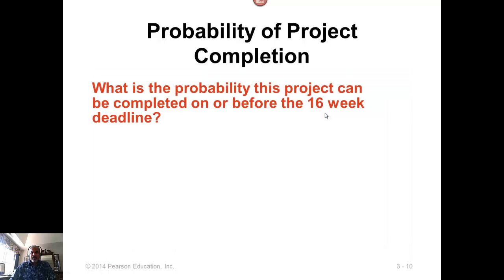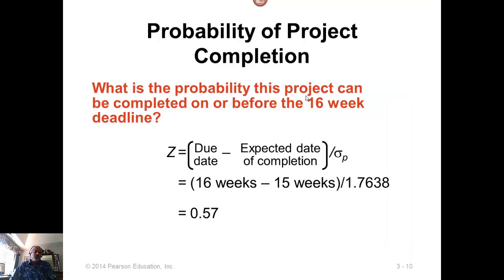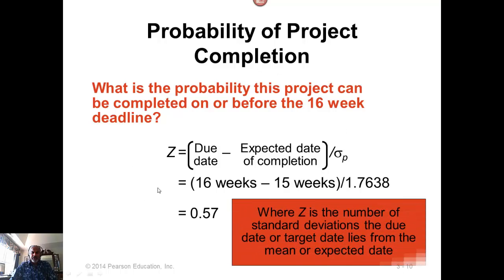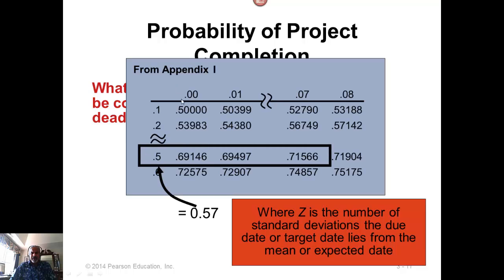Now we can compute probabilities like, what is the probability we can complete the project in 16 weeks? In that case, 16 weeks is the due date minus the expected completion time divided by the standard deviation gives you the Z value. You take the Z value to the normal distribution table in the back of the book, in the appendix. 0.57 gives you the probability. This is the cumulative probability, in other words, the probability that we can complete the project in 16 weeks. If you do 1 minus this, that will give you the probability that we will not be able to complete the project in 15 weeks.